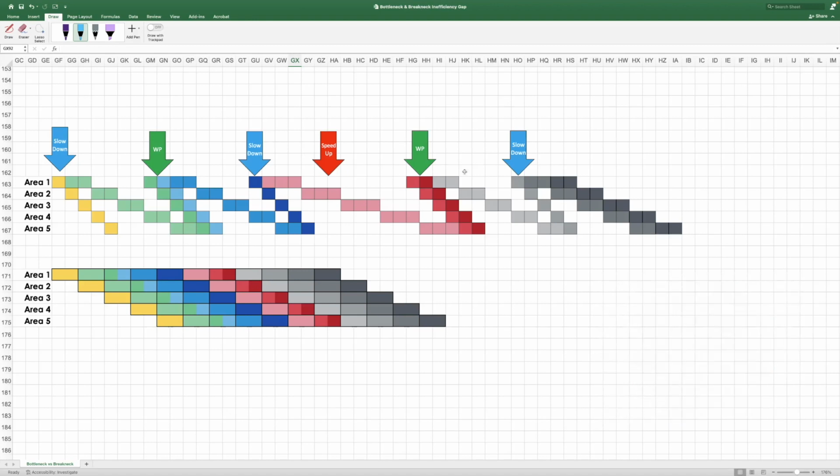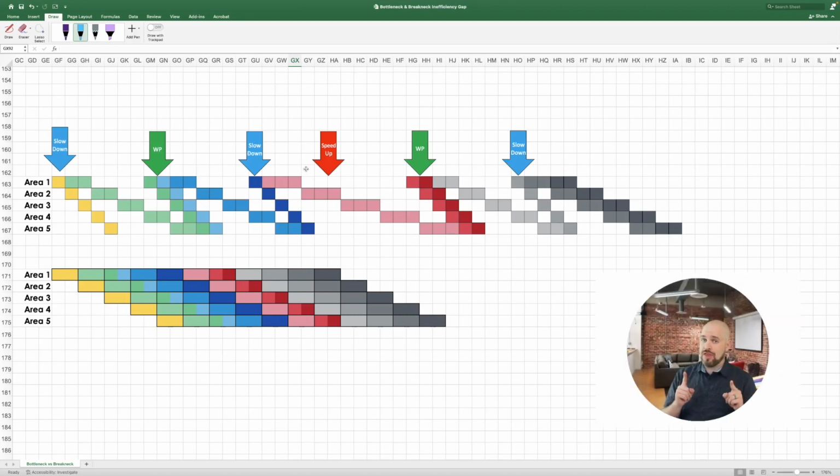So let's look at that. And for those of you that haven't read The Goal, I highly recommend reading The Goal. Think about it if you've read The Goal. What do they find? They find that the NCX and heat treat are the 2 bottleneck resources, and those are the things that they try to optimize. Once they optimize it, they find that there's things that are going too fast, and they have to slow down the rate of production and manage that rate of production in the plant at certain locations to optimize the flow of the entire plant. This is what we're doing.